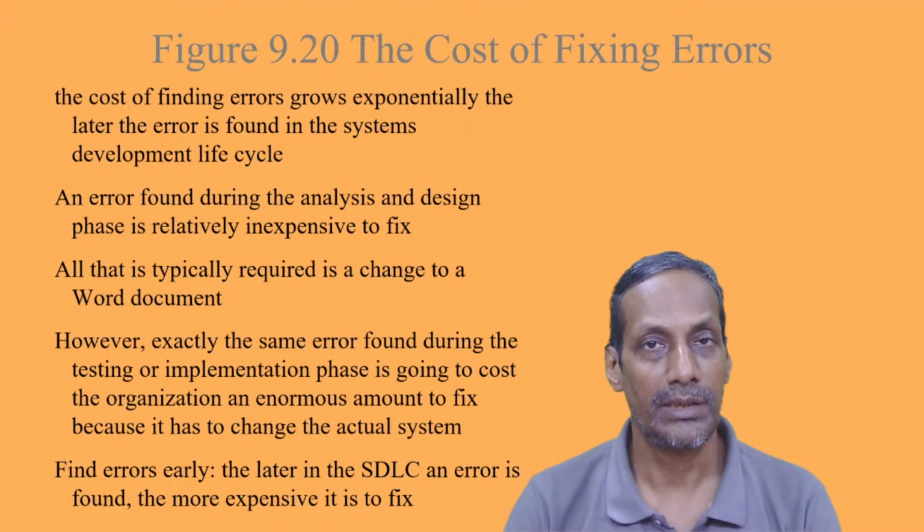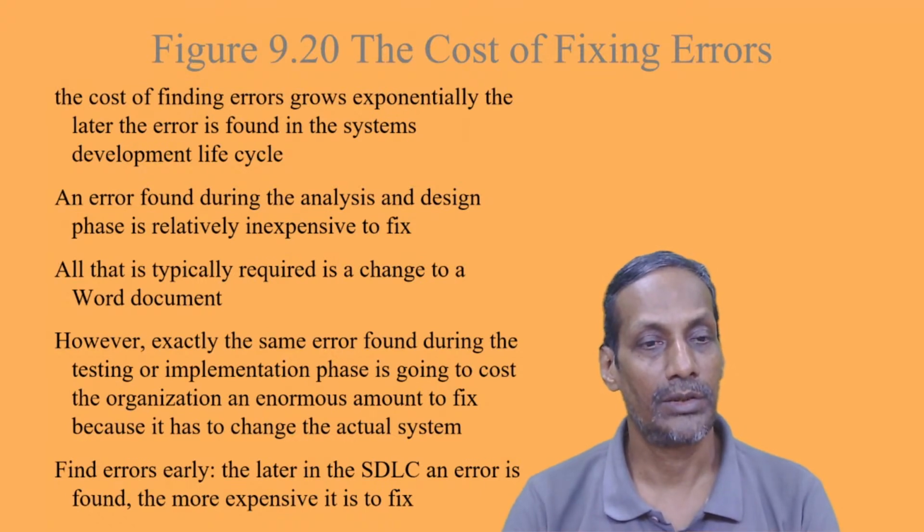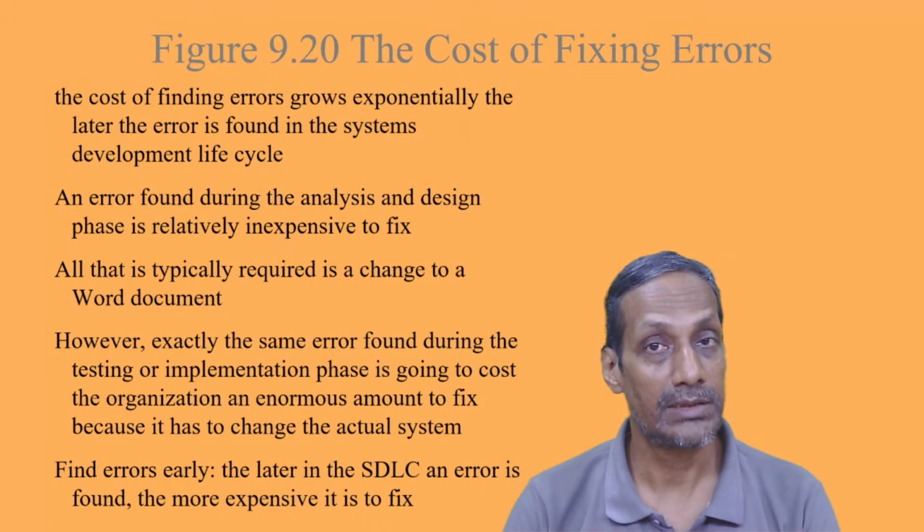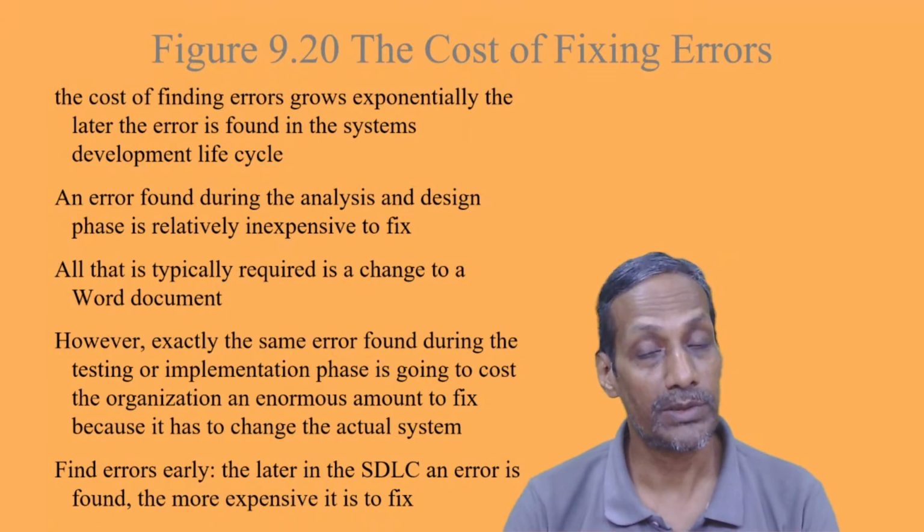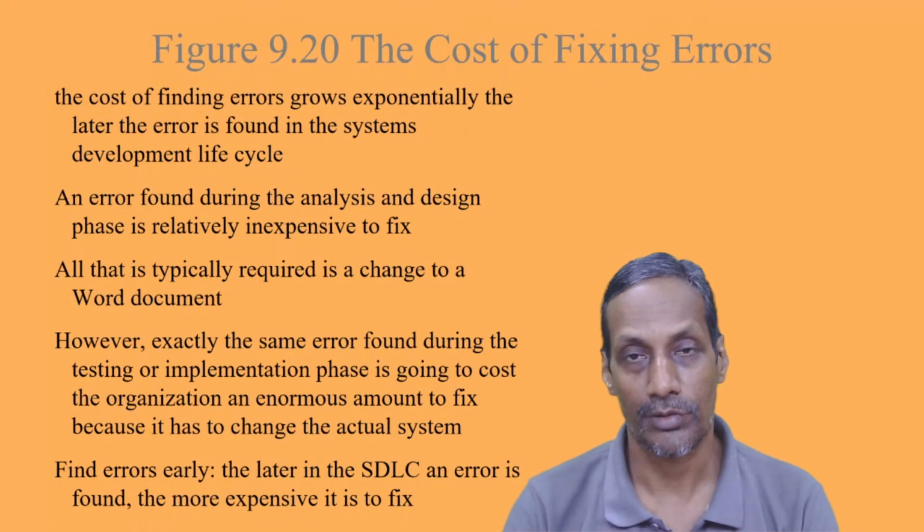Find errors early. This is the best way to come up with the new solution. You have to check errors early. The later in the SDLC an error is found, the more expensive it is to fix. All of you should know.